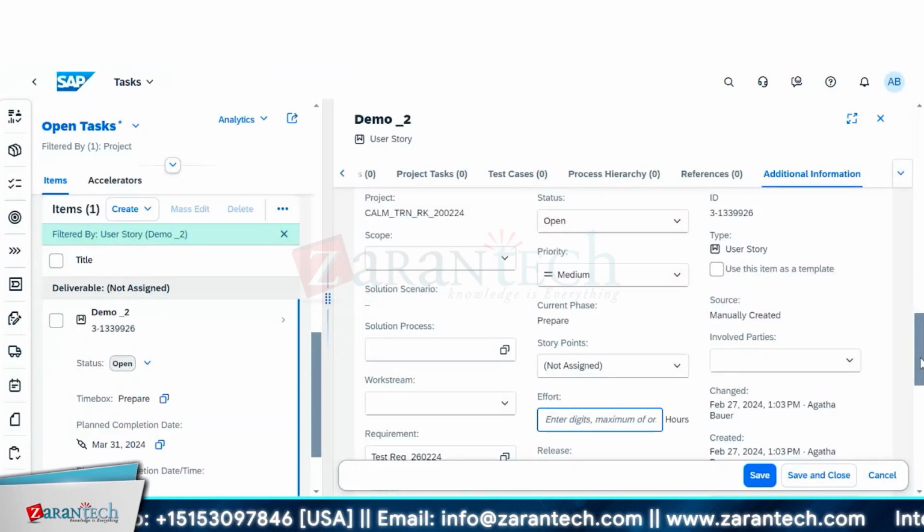Like for a requirement, if there is a refinement, you have to manually go and change it to approval, then only it will be in approval status, or for user stories, right? So all these statuses are also manual. Once your work is done or that state you have cleared, you go and change the status manually, so that the current status shows up. Then only you'll know, okay, the requirement now is approved, now I can start my work, right?